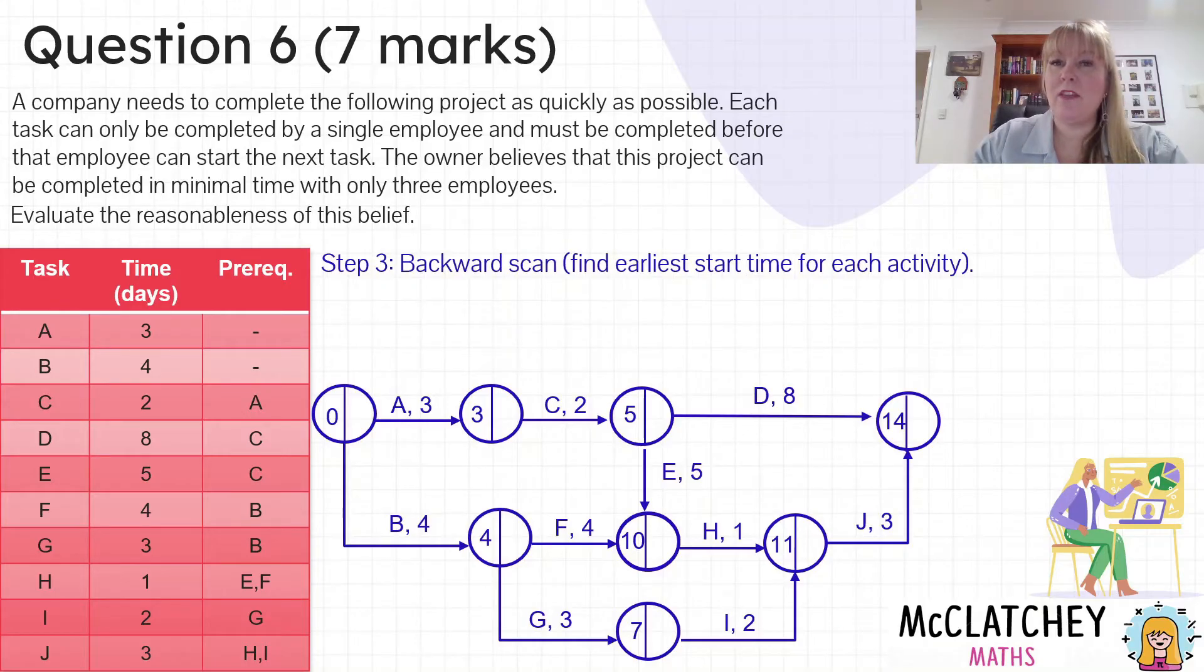So now it's time to backward scan through the network. We're going to be filling out the right hand side of each vertex. Starting on the very far right we start with the same number because they're on the critical pathway, so they must be the same numbers. We're going to move along different pathways here and subtract the value of each edge as we're moving backwards. 14 take away three gives me 11. Then I'm going to move along the bottom pathway and I'm filling out the easy stuff first.